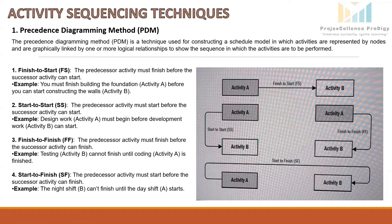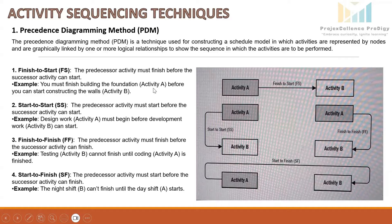The first relationship is Finish to Start, FS. This is the most common relationship — the predecessor activity must finish before the successor activity can start. For example, activity A is building the foundation and activity B is constructing the walls. We must finish activity A, the predecessor, before we start the construction of walls, activity B, which is the successor.